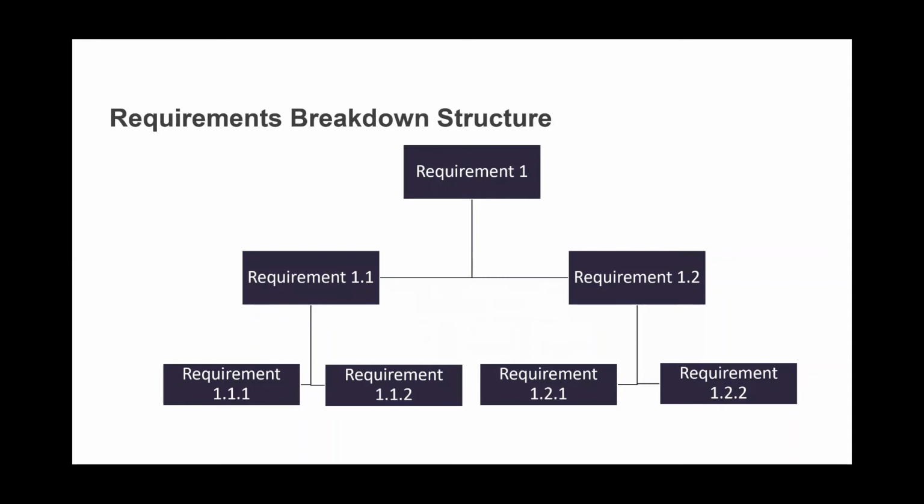So that's the key. When you're defining requirements, you have to allocate them or put them in a hierarchy. If you don't put them into the right high-level requirement, you won't be able to satisfy the high-level requirements. And when I use the term satisfy, it's about verification and validation. If you're not able to satisfy the requirements, you're not able to satisfy the system, and then you won't be able to build properly. I'm not saying that you won't be able to build, but it will have loopholes where you'll need to identify where that requirement went.